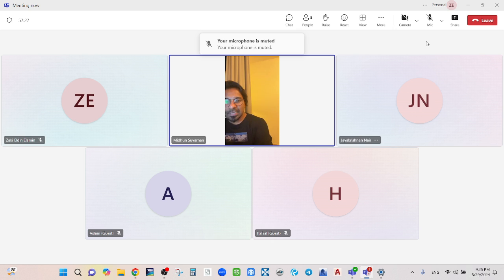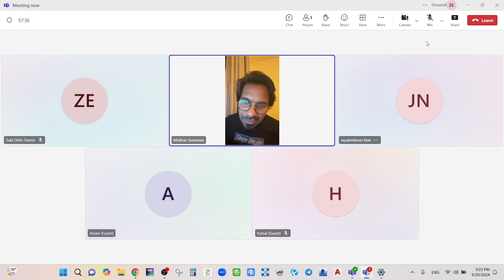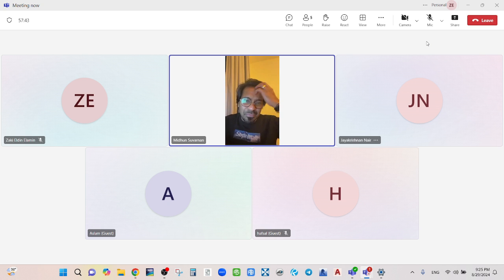So that is the tender bond and its function. Principally, whatever we explained for the performance security, the same is the principle. The normal percentage of the tender bond is sometimes 3 to 5%, but it's better if you put an amount. Ideally it should cover the retendering amount you're going to spend, the additional resources, the time, and the impact on delivery. That's the genuine pre-estimate, so 3 to 5% is fine.